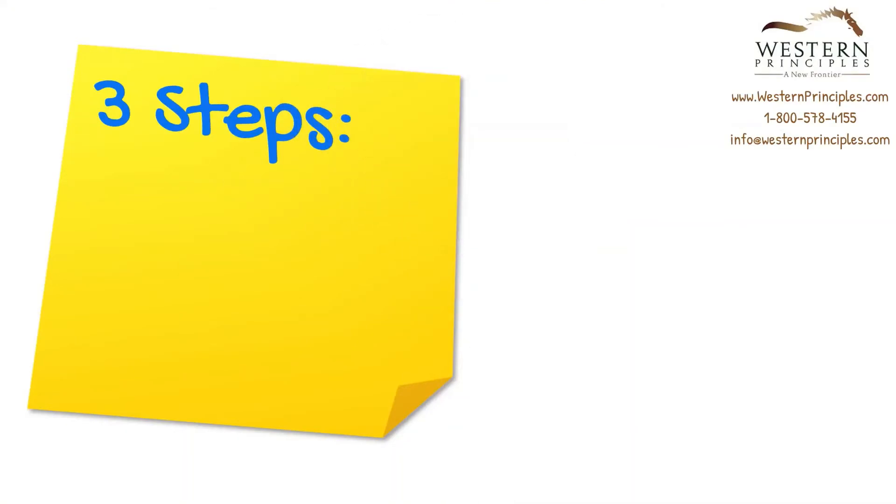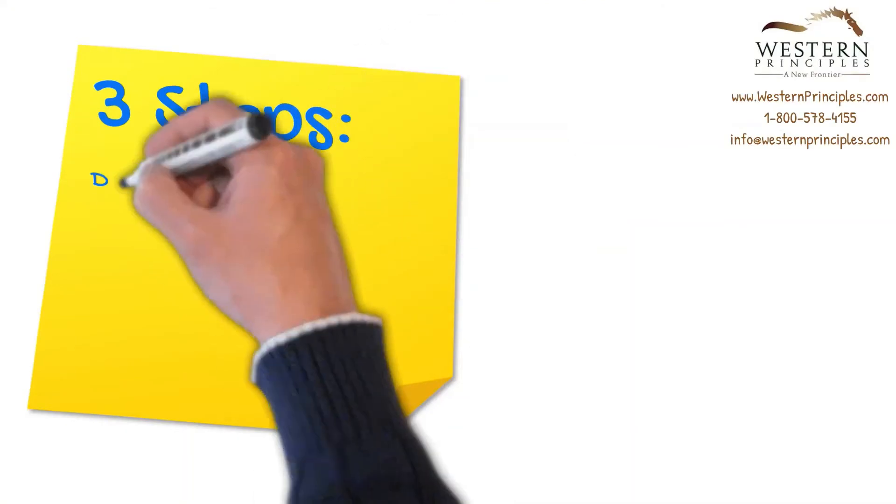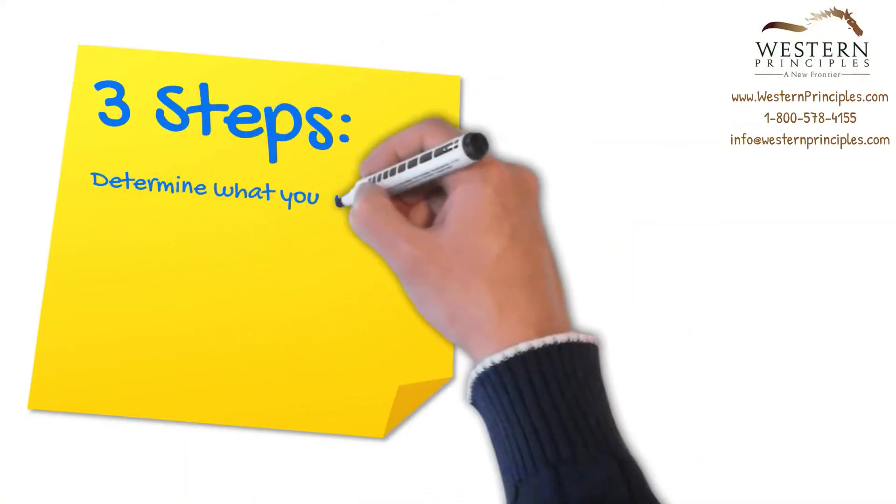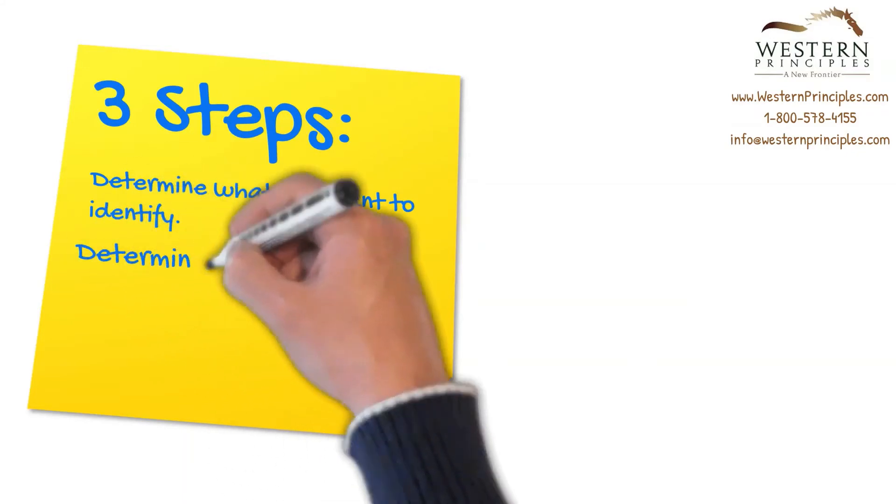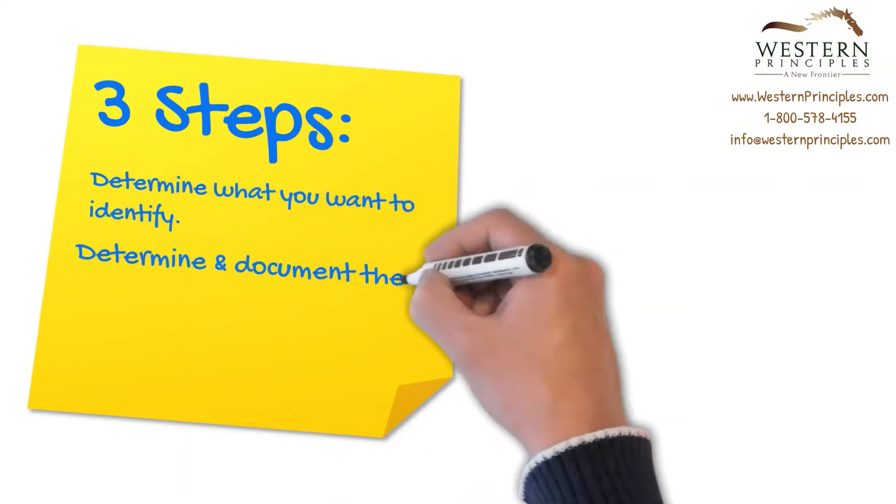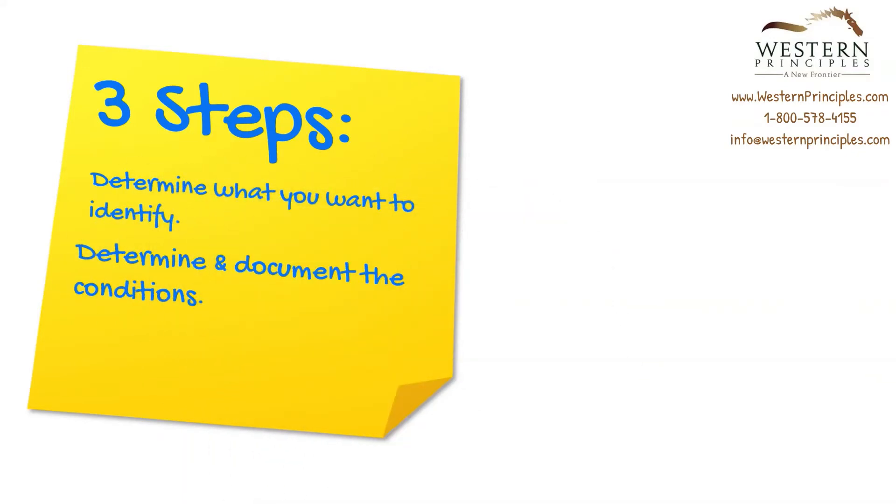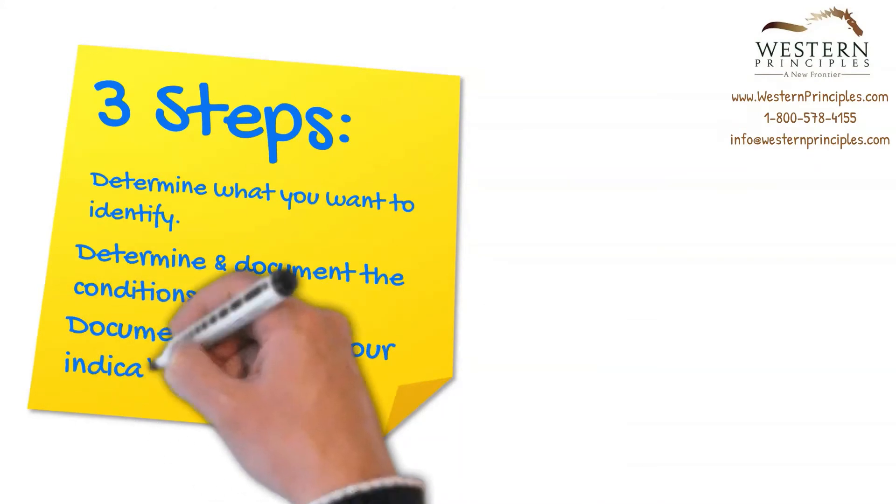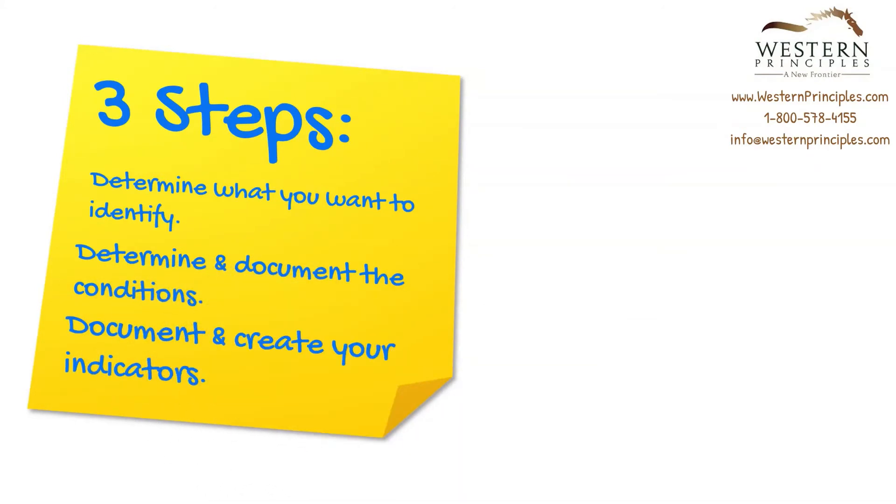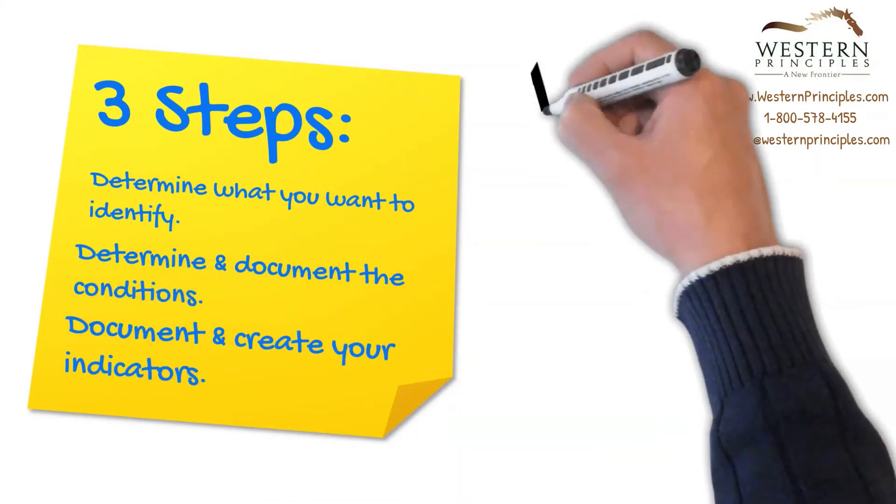The first step is to determine what we want to identify as a problem. You should document what the criteria is so that it's objective. Then we set up a custom field for the column and lay out the conditions for the indicator. What's your red, amber, and green, and what are the conditions you need? Finally, we select the indicator we want to show. It's important to think about what you want for an indicator. We'll talk about that in a moment.